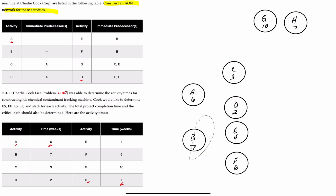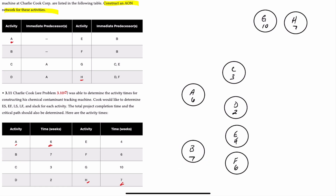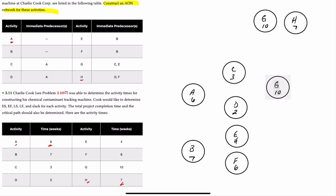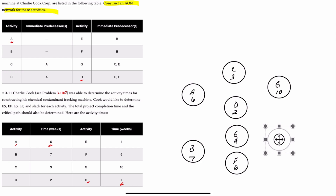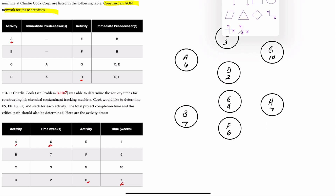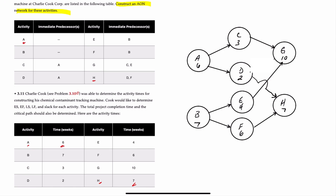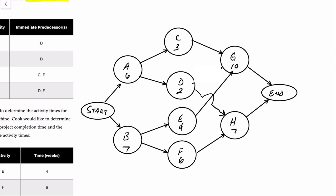We can move B down a little to center it between E and F. G is preceded by activities C and E, so we'll put activity G here. H is preceded by D and F, so we'll place that accordingly. Now we can join everything with arrows. We also don't have a single start or end node, so we'll insert a couple of ovals. And there we have our completed network diagram.